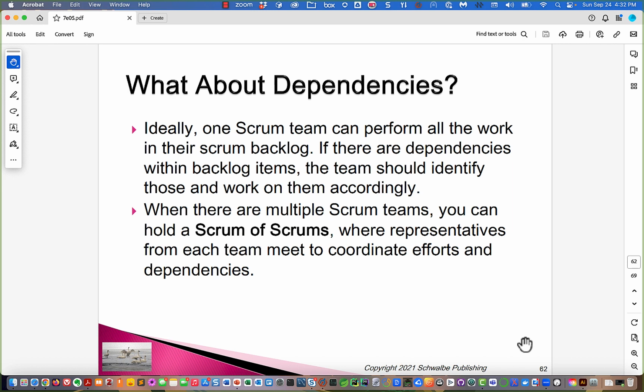Now that can be challenging when we're planning a sprint at the very beginning of the sprint. We might have the product owner, who's a representative of the business. You may have them asking for things that are going to have the biggest payback, but they may not really understand the dependencies. So they may be asking for things we can't do yet because we have to do other things first.